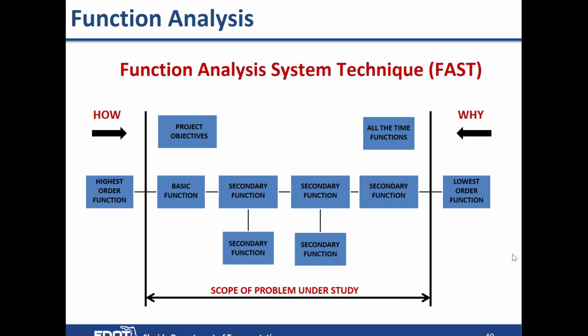And then what you do is the how and the why. So you should be able to move from box to box, from left to right, asking how does that happen? And the next box will answer that question. And moving right to left, you'll say, why do we do this? And the next box will answer that question.